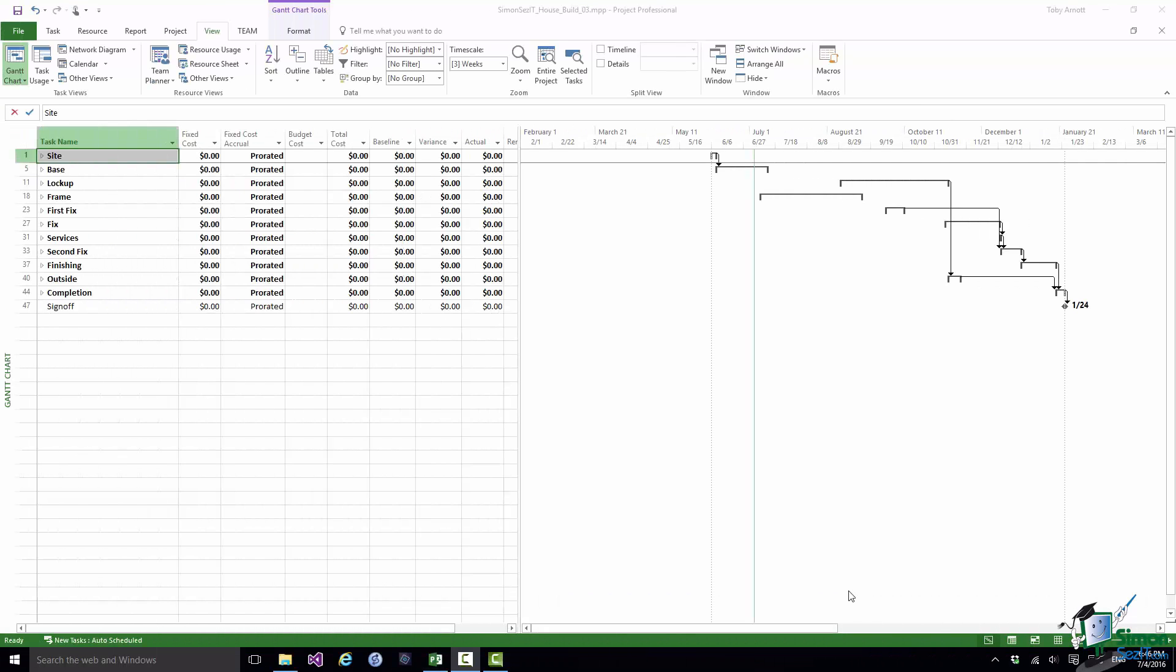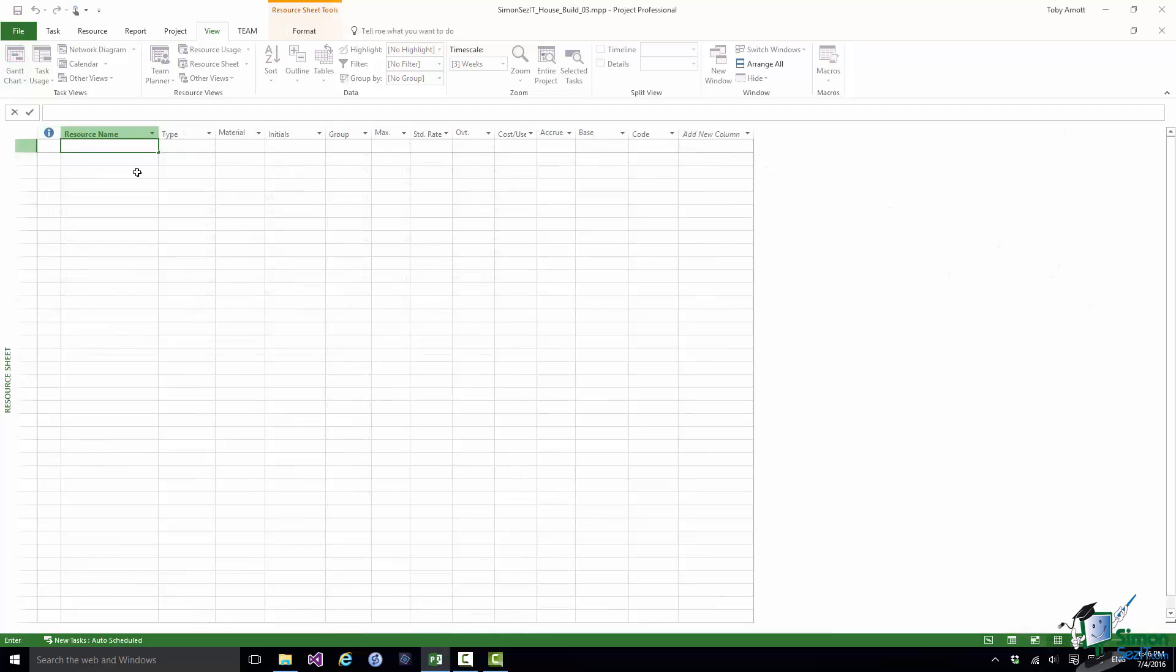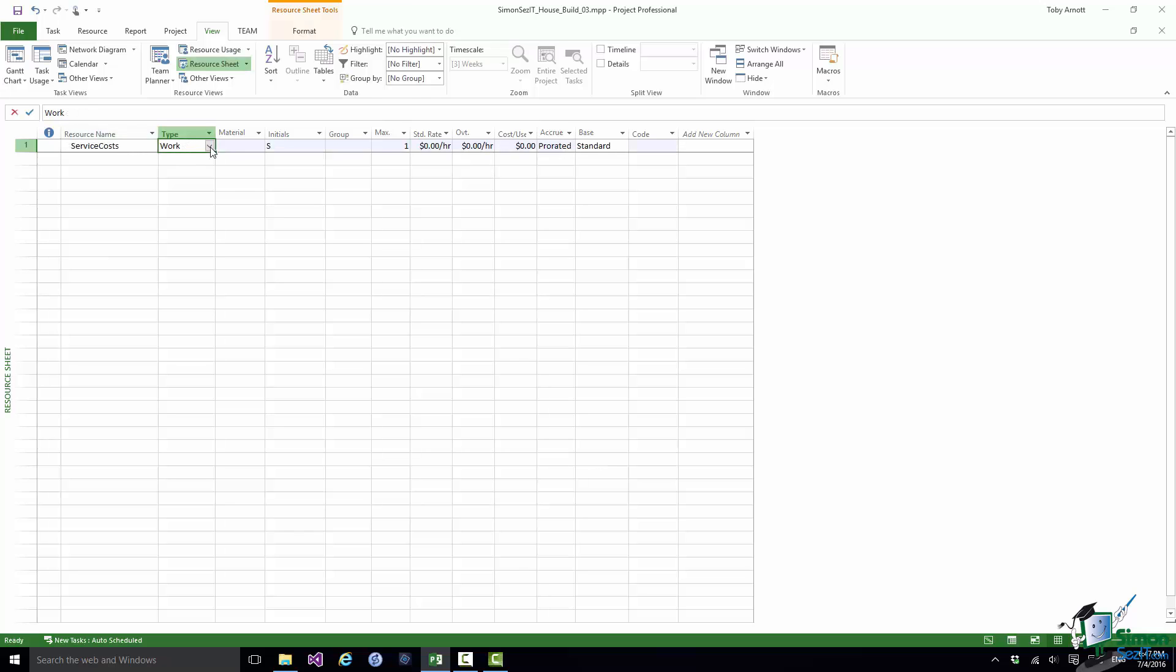Let's use as our example a budget cost for services, and by services we mean things like connecting the house to main services and getting an inspection by a local building inspector. First of all, let's go to the resource sheet and we're going to set up a resource called Service Costs. The type is cost.